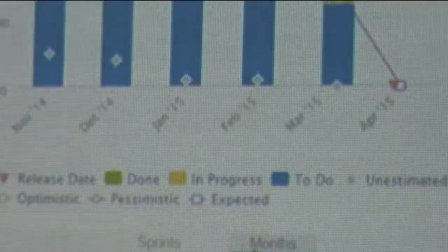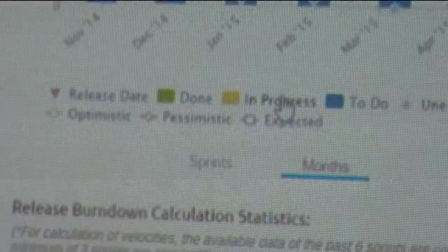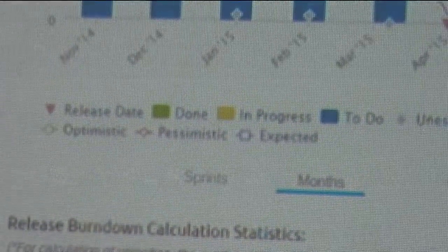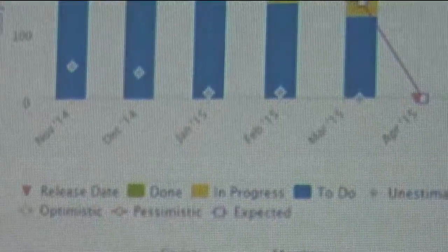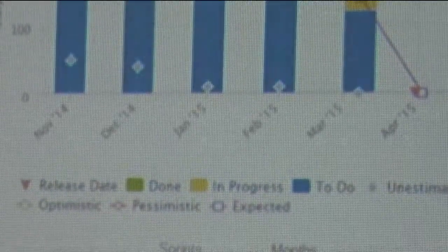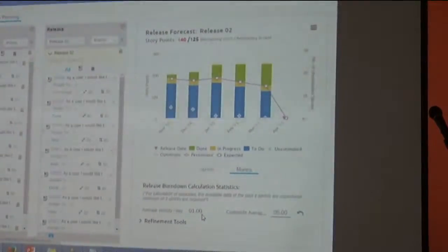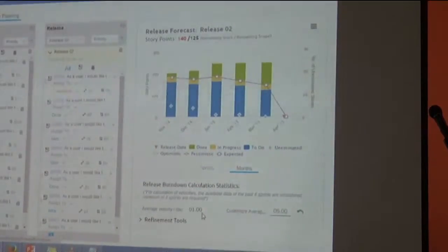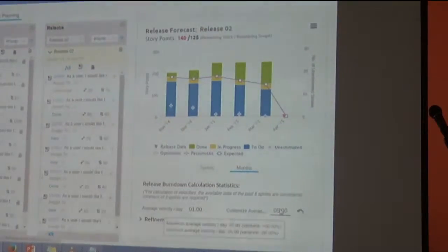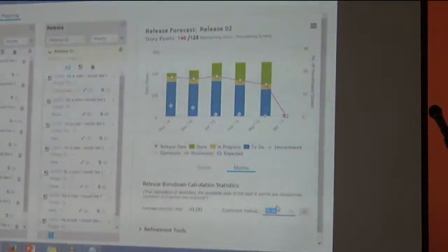Much better. Yeah. So in this case, what we're doing here basically, it's a little mumbo jumbo here, how did we get one and things like that. So the idea is we take your past 6 sprints and we figure out how you've done, whether good, bad and ugly. And then we calculate best, worst and your normal scenario. So then you get a vague idea of the variances that you have. And go back to this, I'll change it to 3.